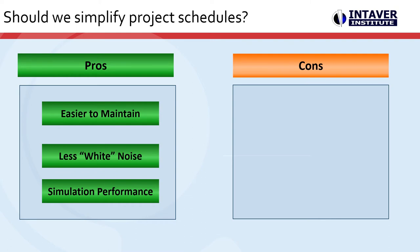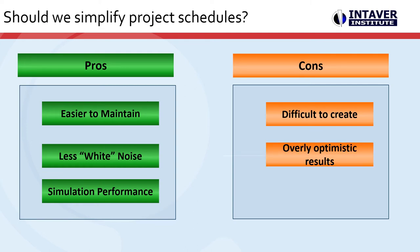On the downside, creating a balanced model can be a difficult job and effort required can easily be underestimated. Simplified models eliminate the complexity and logic that can be the main drivers of project execution. And finally, the work can be viewed as redundant.